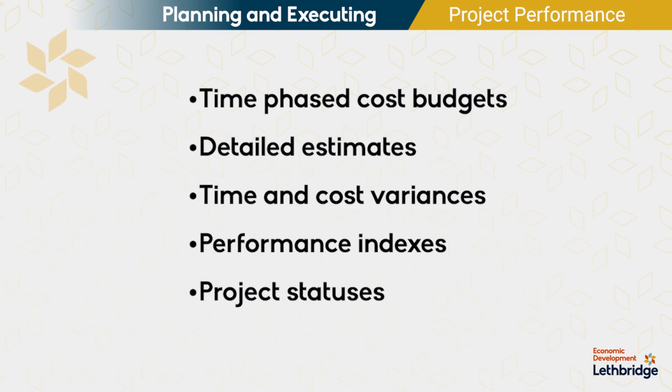If you want to know how much more money you're going to spend, you take your estimate at completion and subtract off your actual cost, and that's how much more money you're going to have to spend on that particular project. That's important because keeping your stakeholders, particularly people like CEOs and others that are in charge of the project, or at least have a direct relationship with the success of the project, informed of where you're at with your budget should be a priority of yours. They typically will care about where you're at in terms of spending and budget and so forth, especially when you're dealing with very time-sensitive kinds of projects.